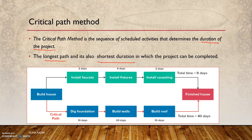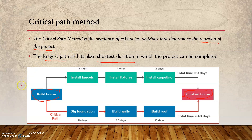It can be confusing but it is pretty straightforward. Let's look at 'build a house' as a project — a finished house is the output of that project. You have about six different activities: dig foundation, build walls, build roof, faucets, fixtures, and carpeting. As we have seen earlier, dig foundation could have multiple series of activities underneath it in the work breakdown structure.